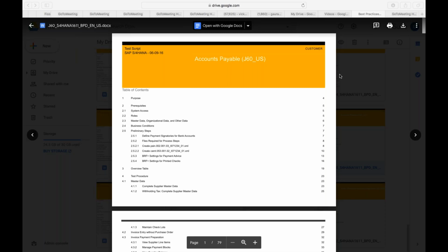Even if some of you might have used a sandbox system or shown some other customer's system from your side, it was never mentioned in ASAP methodology. ASAP never says to show the system to the client during the business blueprint phase. But now in the explore phase, we are going to carry out all these best practice documentations, and we are going to show all these things to the customer in the workshops.